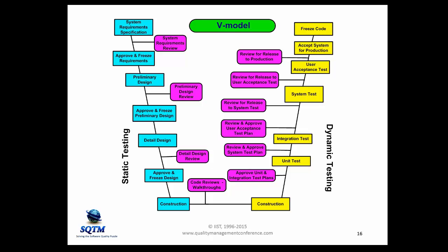Well, once those requirements are approved and frozen, they go into the CM control library, and a working copy is checked out for the next process, which is design. Again, quality control testing gets involved in the design.